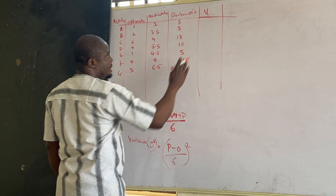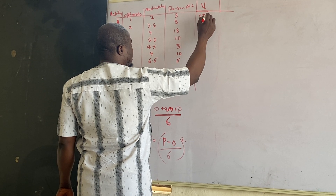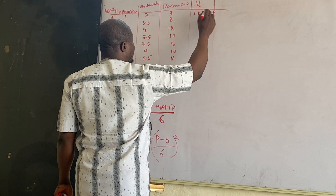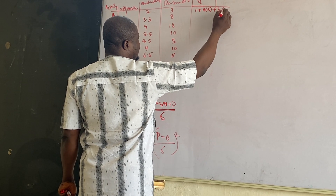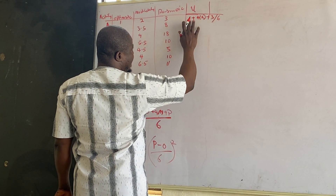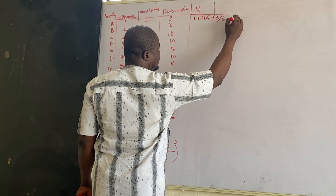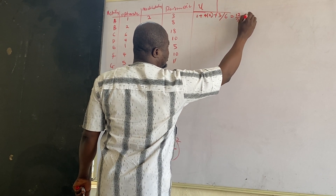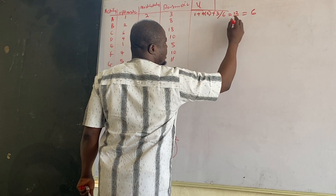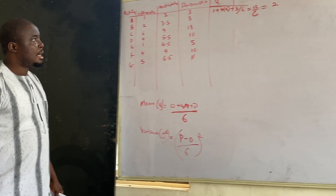For the first example, the mean is: 1 plus 4 times 2 plus 3, all divided by 6. That gives us 1 plus 8 plus 3, which is 12. So 12 divided by 6 gives us 2. That is the mean for this activity.